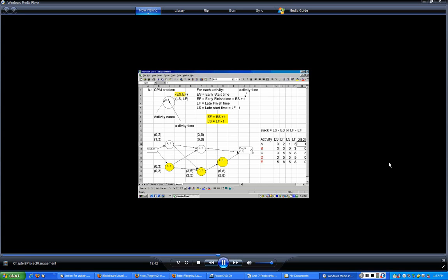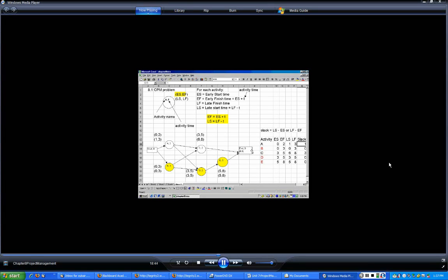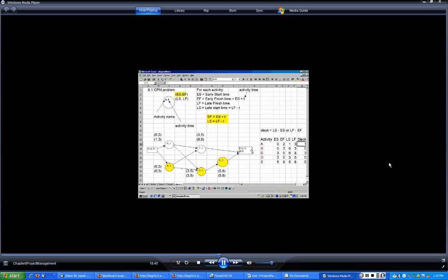Of course, selecting a location and obtaining speakers do not have any predecessors, so those are these two activities, selecting a location and of course a speaker. So these can proceed independently. These activities have to start for the project to start. So this basically signals the start of the project. So let's say that is the starting point.